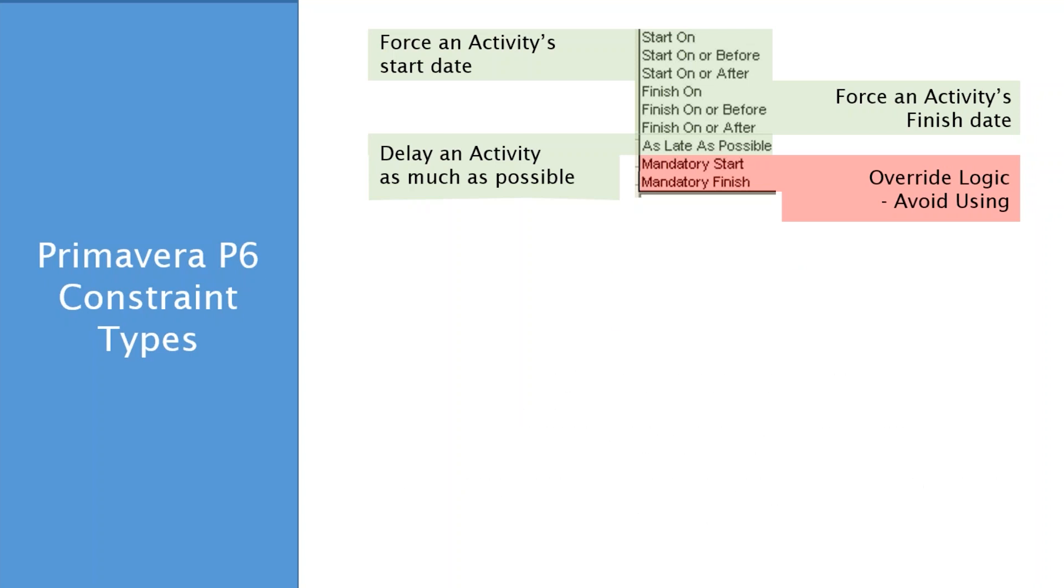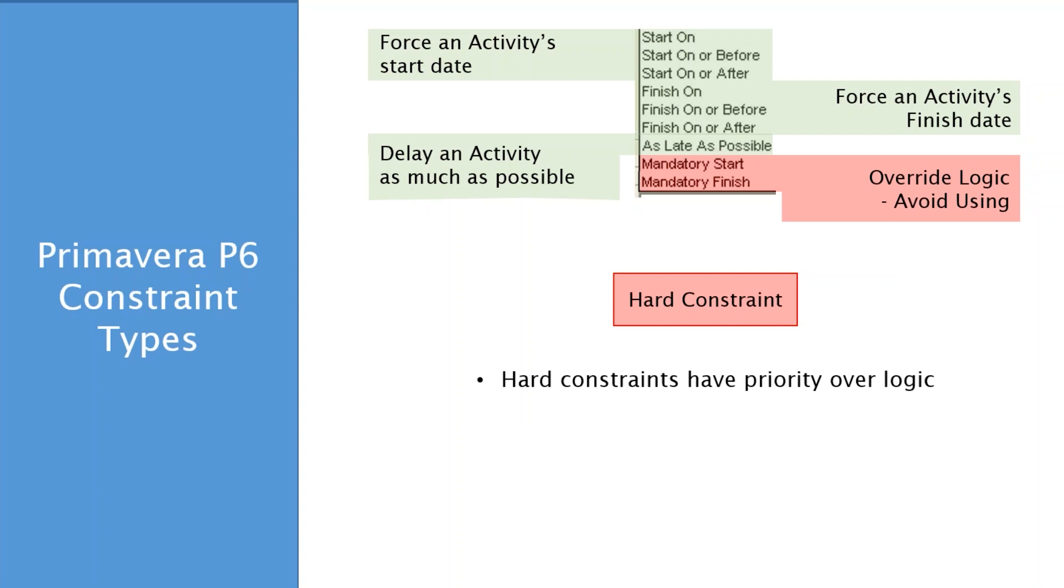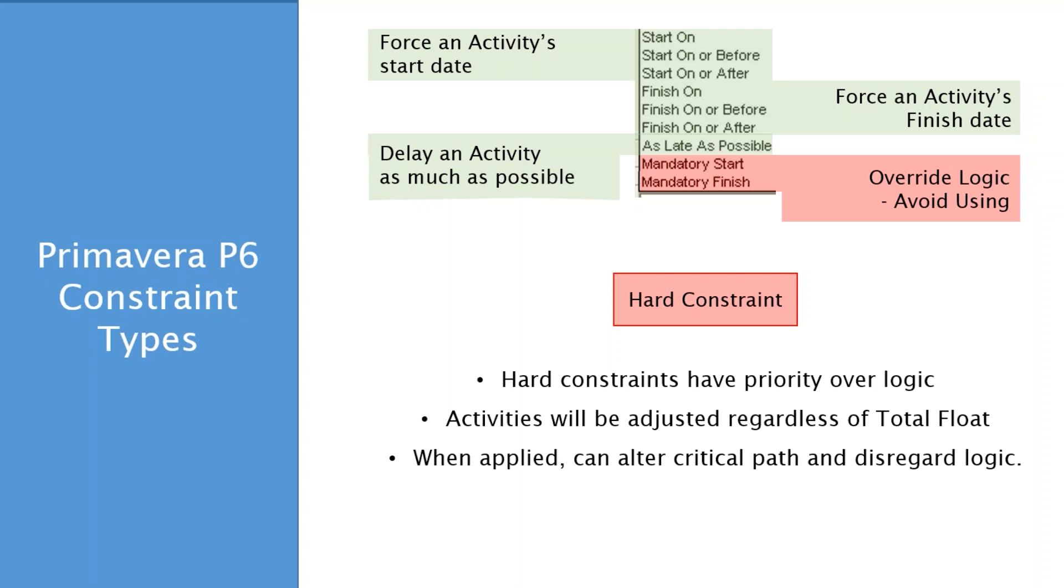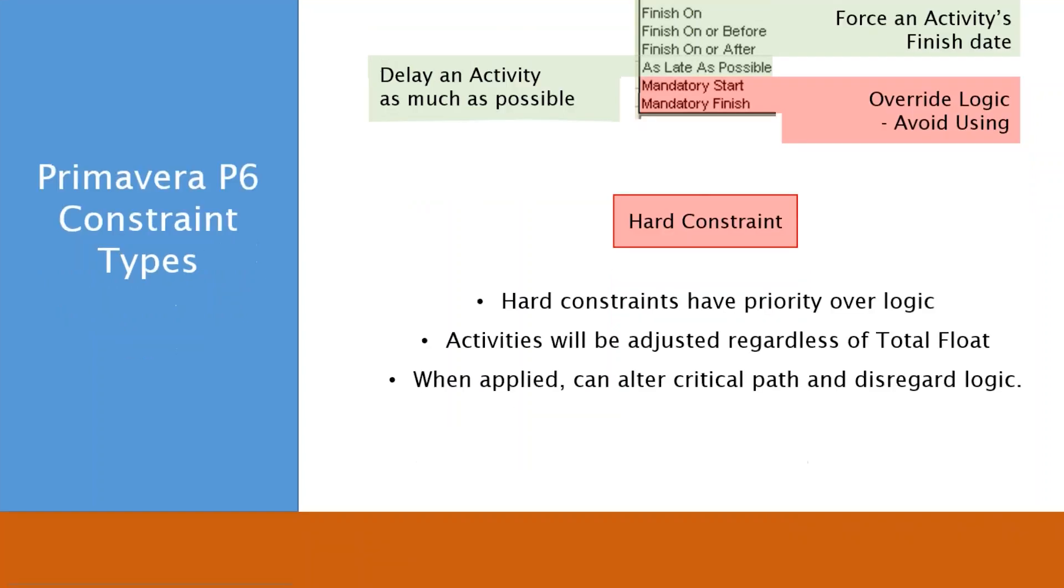Now, the hard constraints. Hard constraints have a priority over logic, meaning they can override or break logic. And that is an undesirable result. We don't want that. Activities will be adjusted when you apply these, regardless of whether there's total float in the activity, or that it's negative, it doesn't care. And the challenge here is that when you use the hard constraints, if you apply them to your critical activities, you can easily alter your critical path. And we know that the word path in critical path is a key point. The path is a path through the network. And if you break one of the linkages in the network, then it's not a path anymore. So this is one of the challenges of using hard constraints.